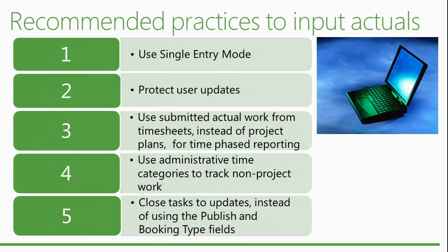What is the list of all the admin time categories or non-project time that is available to record your time. The purpose of this is to avoid having 30 lines of non-project time in your timesheet when you open it, and to have just the specific default ones show up. And if you need more, you have a way to select additional ones from a list and put them in your timesheet. Another option is to also set these admin times as automatically approved or not.